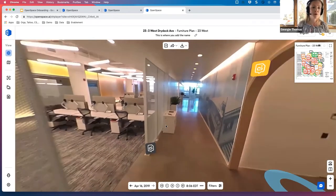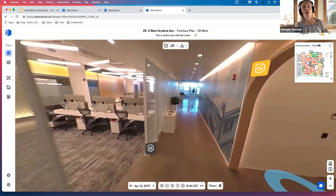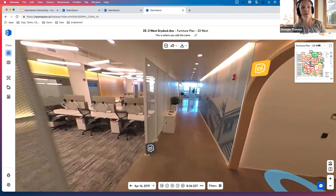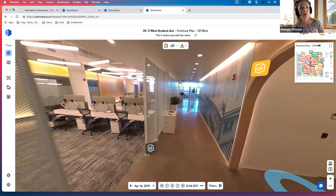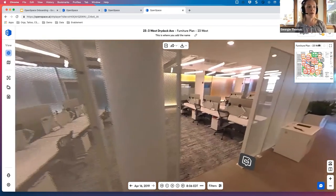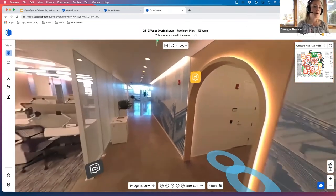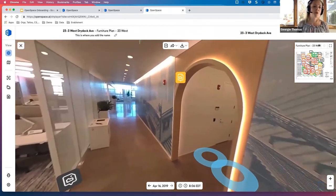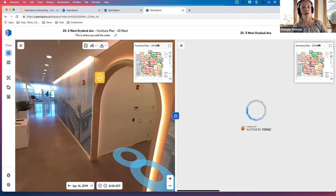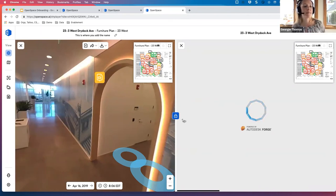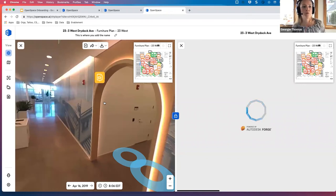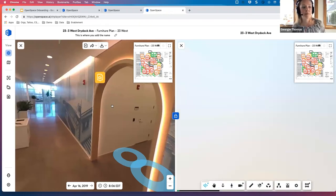Next we'll go through the BIM viewer. So OpenSpace has an integration with Autodesk Construction Cloud. So what that means is any 3D model that you have of your project, you can upload that into the OpenSpace settings. And then after you have at least one capture, you'll press this BIM viewer button, and then you'll be able to see the side by side comparison of where your project currently stands and the final design. So this is a really great way to verify work in place and also be able to give visibility to your project team on what's being installed and making sure that everything is being built as it should.